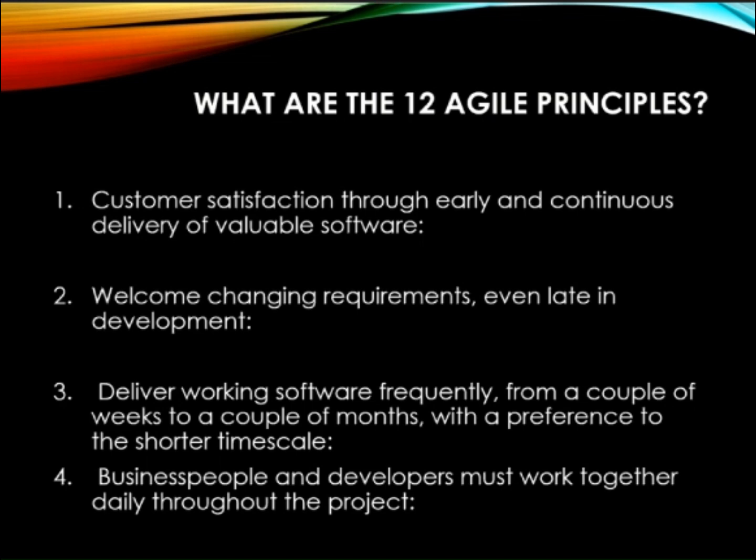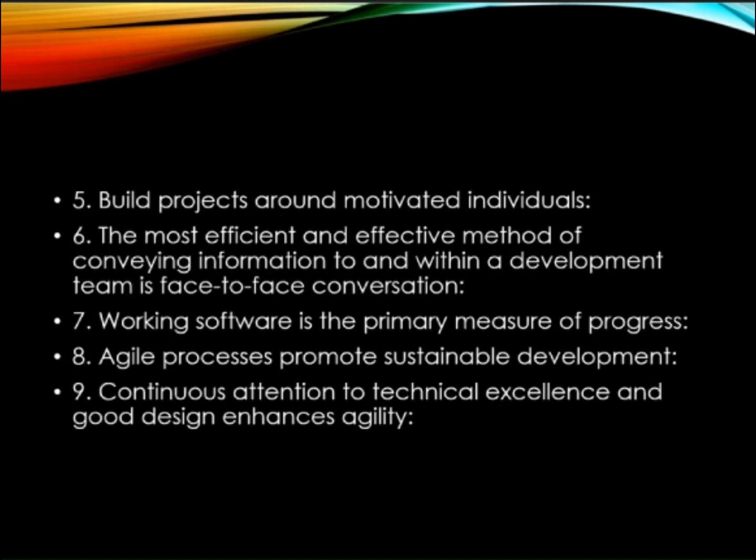Our fourth principle is business and developers must work together. Keep communication daily between teams and client. In the daily scrum call, tester, developer and product owner all share updates and resolve blockers. Our fifth principle is build projects around motivated individuals. Simple: trust the team to make decisions and deliver. A developer chooses the best approach for the login system instead of waiting for the manager's approval.